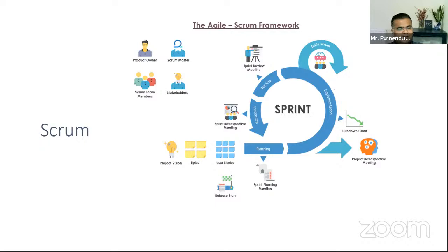So next time, in the next sprint, what we would do is break our user stories even smaller. And we'll say, we can't implement all. We have to just pick up the ones which I can do in 2 weeks, so that my testing team has 1 week and my deployment team has 1 week. And we have enough time to fix the code and make it release, right? So this is what comes in the retrospective.